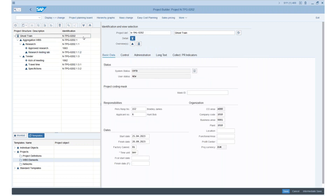This raises the question: is this feasible? Do we want to do that? One integration concept is that there should be one leading system for a specific type of data or specific fields. For example, you might say WBS element creation shall happen in SAP and only dates are changed from Planisware, or vice versa. However, I want to show that we can synchronize structure in both ways, because roughly 50% of our customers start in SAP and 50% start in the PPM tool — so both use cases are important.